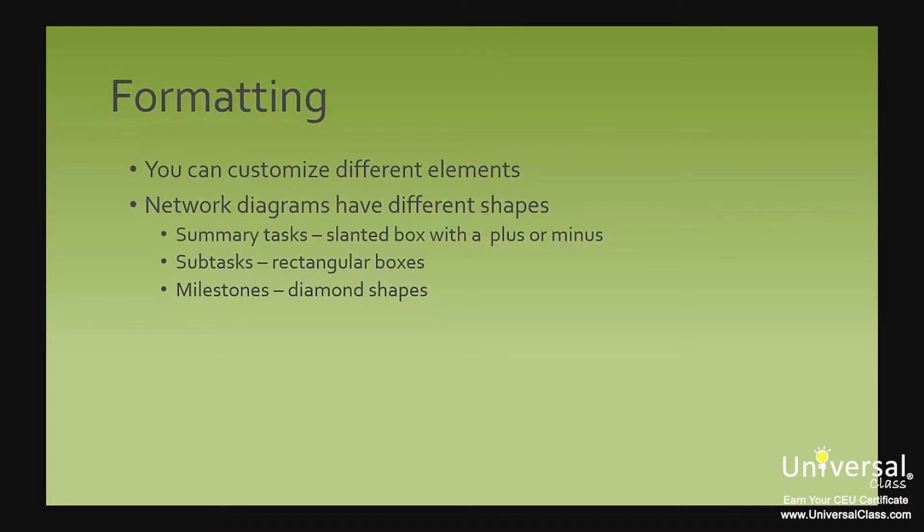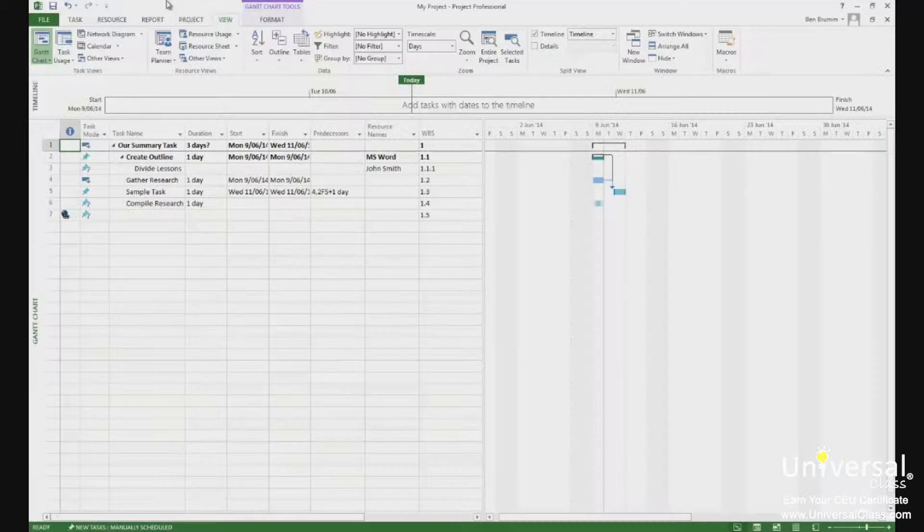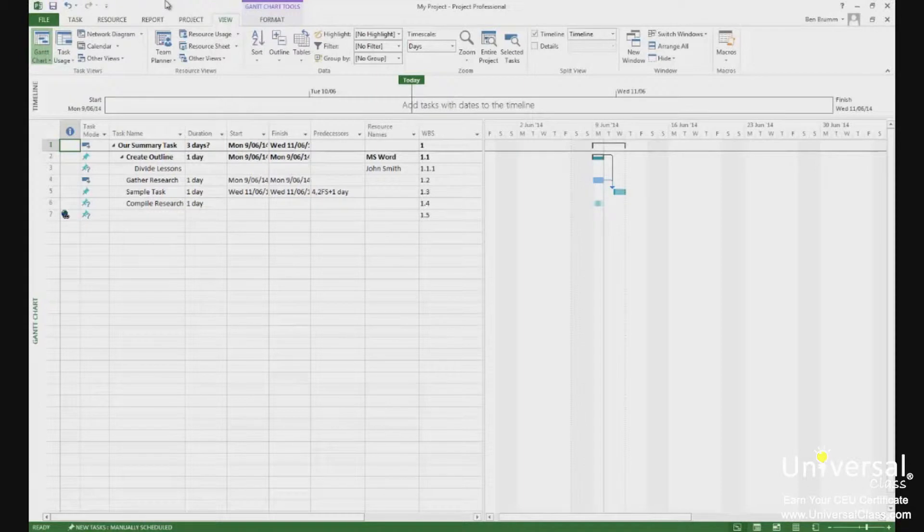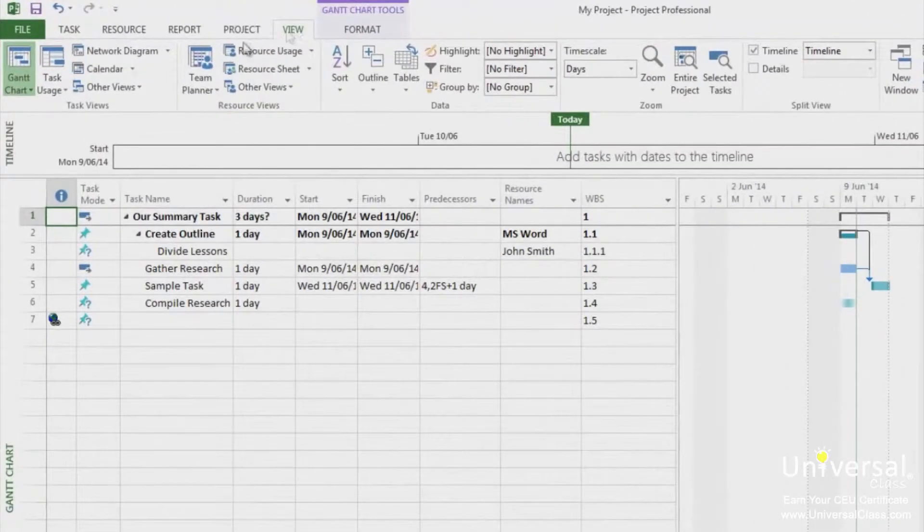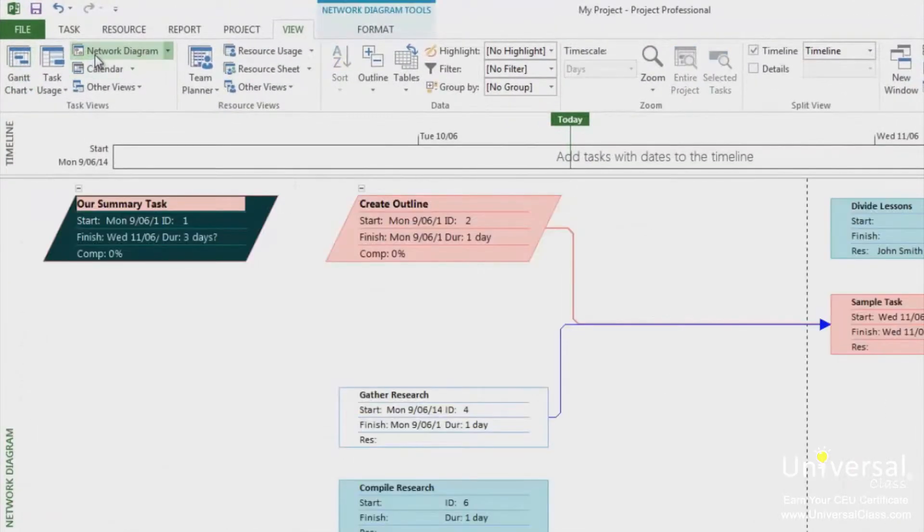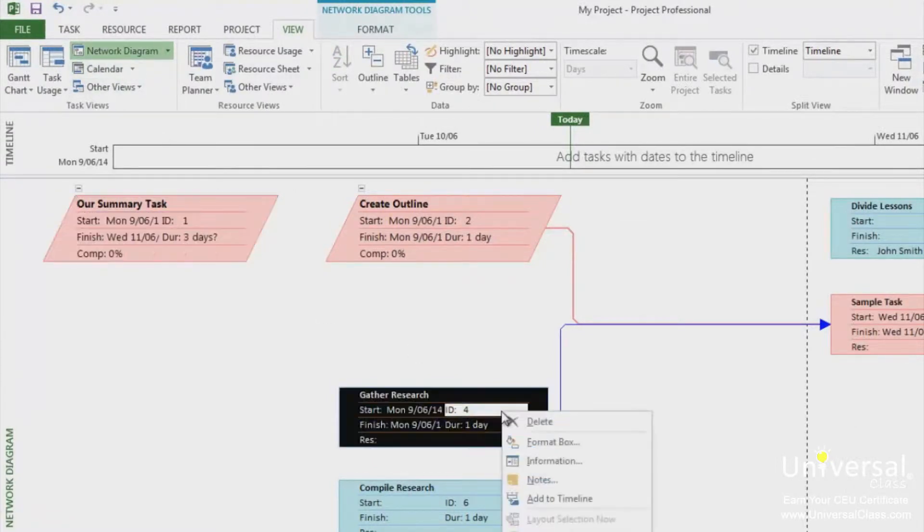Project allows you to change the formatting by individual box or type. To do this, go to the network diagram view by going to the view and clicking on network diagram. Right click on the task you want to change and then select format box.